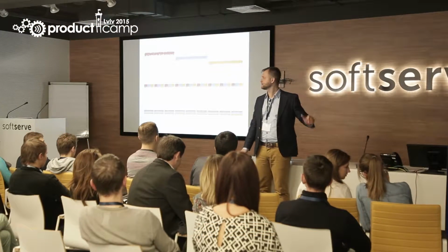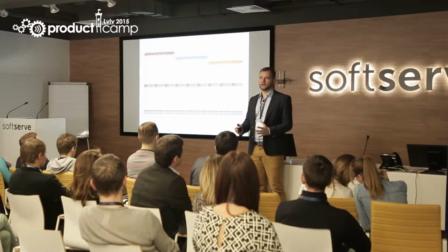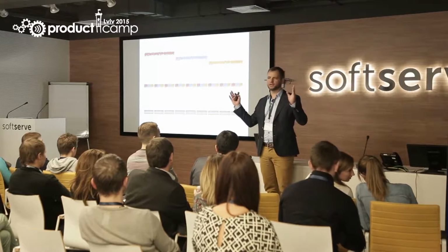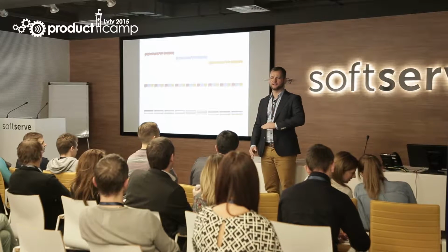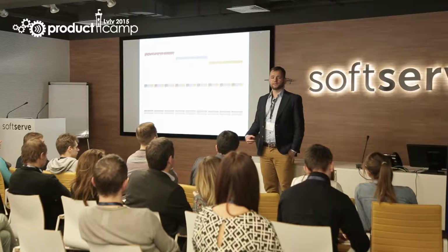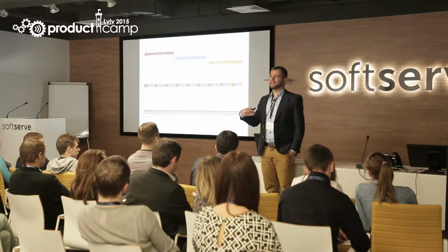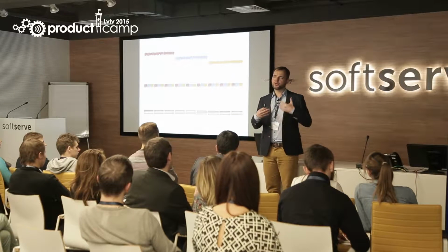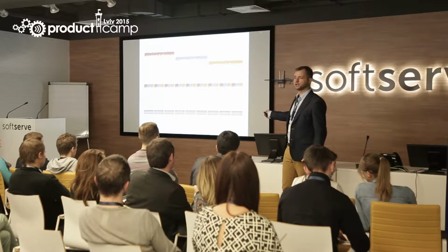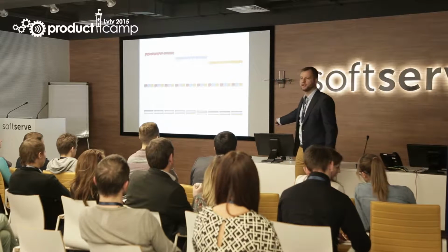We're working in short cycles. The cycles are called iterations. By short, I mean 1, 2, 3, or 4 weeks at a regular pace. And during the cycle, we do everything all together: analysis, implementation, architecture, testing, deployment, whatever else is needed. 3 is just a number for the purpose of this presentation. That means that the phase of analysis, of preparing requirements, is actually not a phase at the beginning of a project, but it takes the entire project.